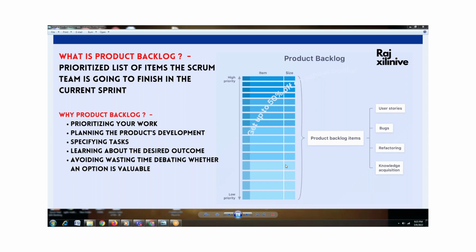when we are prioritizing the work, which is nothing but the user stories. For that reason, the product backlog is used. If you can see the diagram here, high priorities will be in the top position, whereas low priority will be kept in the lowest position. These items are the user stories I'm talking about. Whichever user stories are high priority will be put on the first level, followed by the intermediary and low levels. This is how the structure of a product backlog is generally maintained.